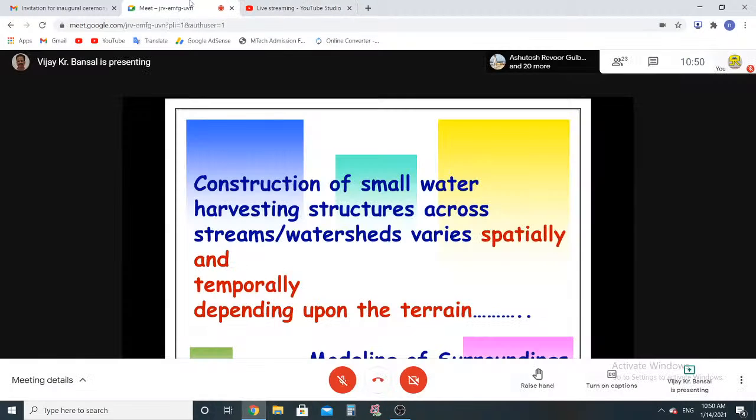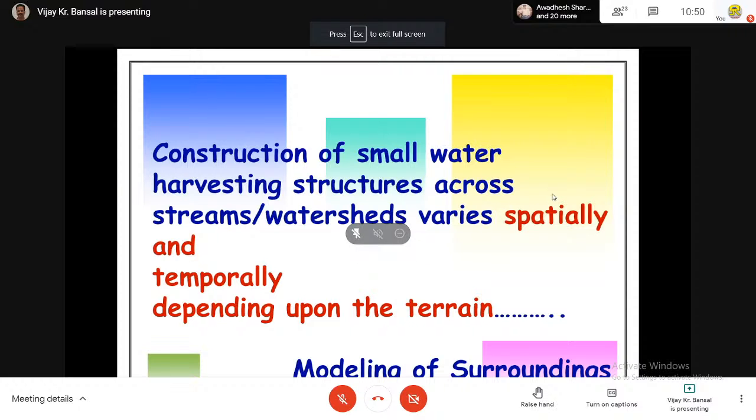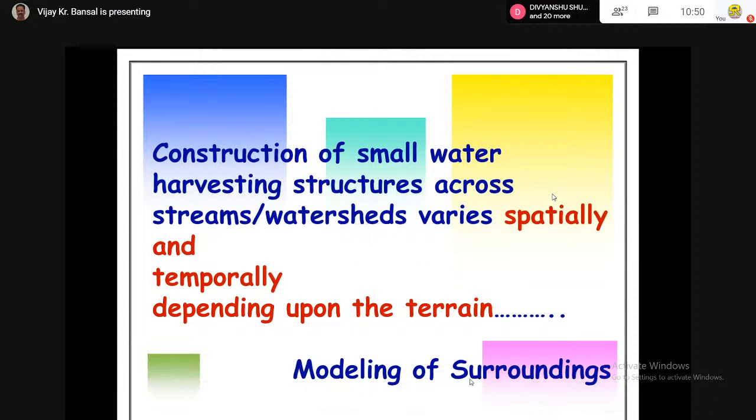3D model with its execution schedule, which is time. So that makes it complete 4D: 3 dimensions of space, XYZ, plus 1 dimension of time. Now the 3D model is linked with time to generate animation. So you will see an animation of construction of that particular structure or monument.